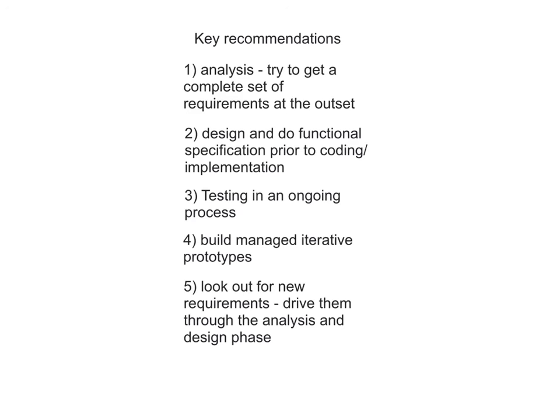in test things that you've tested previously to make sure that some bit of code or some chunk of functionality that you've added does not have any detrimental effect to other things. So don't worry about the new requirements, just drive them back through the cycle, through the analysis, through the design, and then into your implementation phases and into your prototypes.